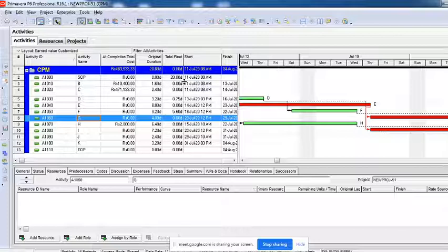So it becomes the project manager's responsibility. Most of the time, if it is a contractor's problem, then the PMC will not be involved at all. They will tell the contractor straight: look, this is your problem. You sort it however you want, but we cannot change anything in the planning. So the baselines are constant. Baselines cannot be changed. But if there is really something like COVID-19 or floods, where the client is also helpless in many ways, and the contracts we made earlier are not valid to be considered now, then the change in the plans will be approved by the client, and so on and so forth. So yes, baselines are very important.